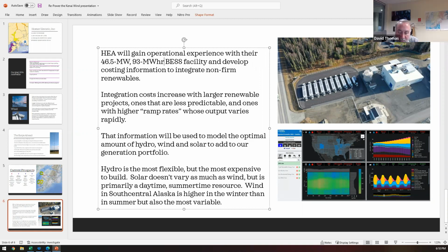Sure. So in our most recent effort, we had some consultants in the Midwest, which is sort of where the center of U.S. wind production is, assist us in the desktop modeling, and they developed an initial, not fleet, but selection of 18 sites. And then with our local input, like, I really don't think people at home are going to want that in their viewscape, and some considerations like that, we ruled out a few. And then to go from now 14 sites down to 4, where we wanted to both apply for these AEA Renewable Energy Fund grants, but also, regardless, we want to investigate these sites further, and get that preliminary design, get the meteorological data to prove them out or not.